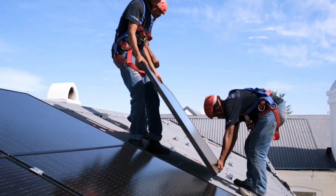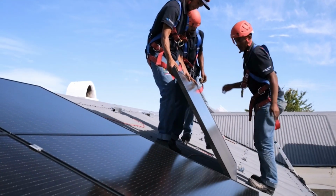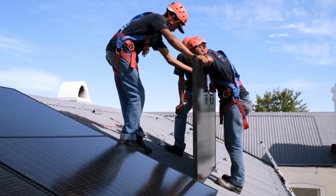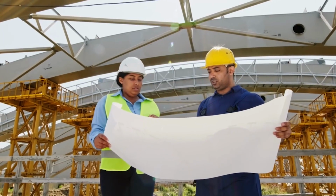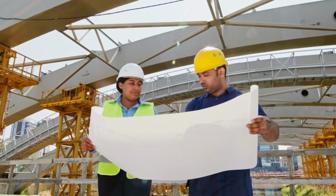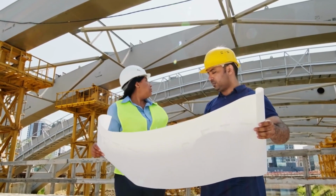There is no constructability review or ability for the installers to provide input to the design to allow design packages to be optimized. There is no operability review to allow the commissioning team and operations team to provide feedback to the early design phase of the project. Design packages are not being prepared in the same sequence as the commissioning and startup sequence. The design team is responsible to determine systemization of your project.